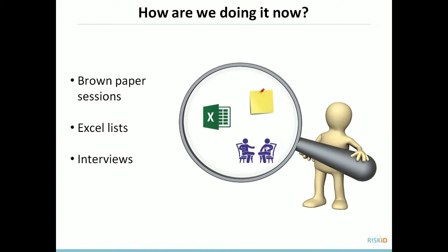And the last one is interviews. You go talk to that person, you try to get the risk from their text and speech. I think it's a very good method, but it takes a lot of time. And also, writing down the transcript could have some errors. And it's one-on-one. Each time it's a one-on-one relationship, and then you're missing again the integral view on the total risk.